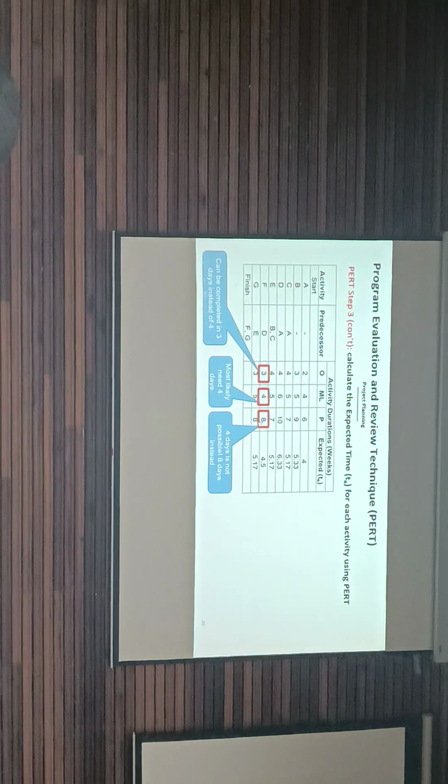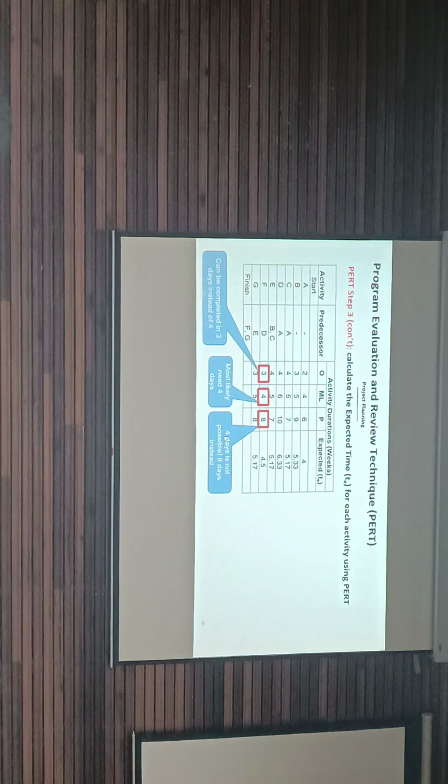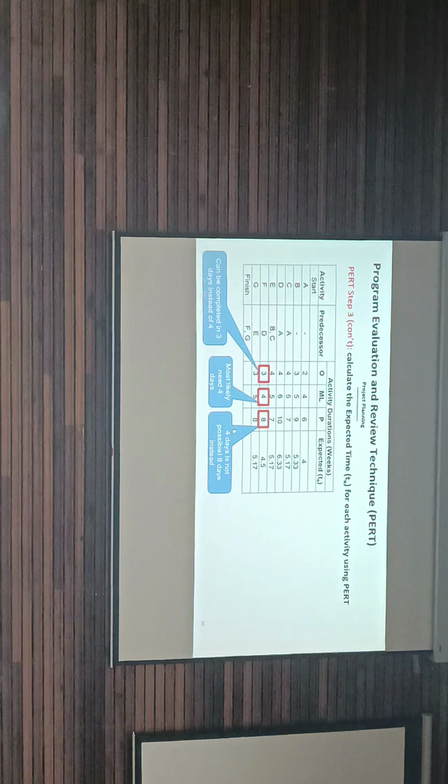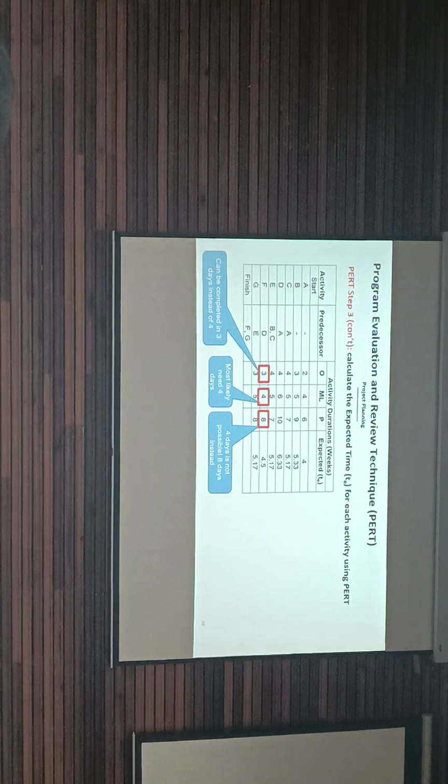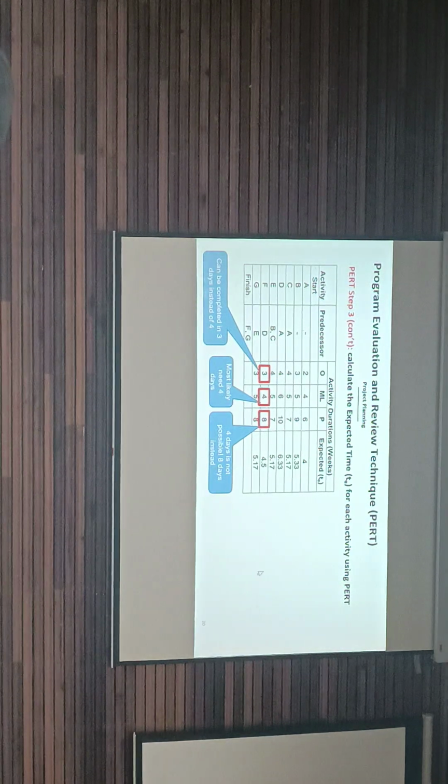Okay, so you find that you can't finish in 3 days, you can't finish in 4 days. You are not confident. Okay, then you put a bigger number. Okay, so 4 days not possible, 8 days instead. You give 3 estimates. So one that's likely, one which you are confident, one which you are not confident. Okay, so you put in 3 numbers.